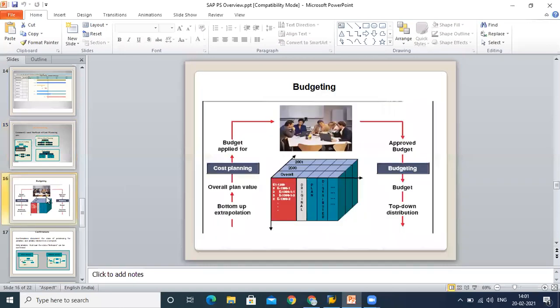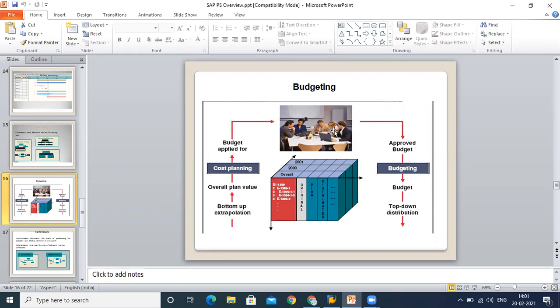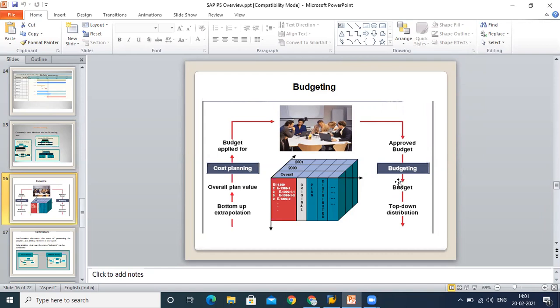Now we move to budgeting. Here you can see that cost planning is coming from the left hand side, and there is a discussion based on this. A group of people is sitting and discussing different aspects of cost planning, which is your initial estimate. Based on that cost planning, the final budget is derived. Cost planning is a kind of input which goes here, and after discussion you can finalize your budgeting.